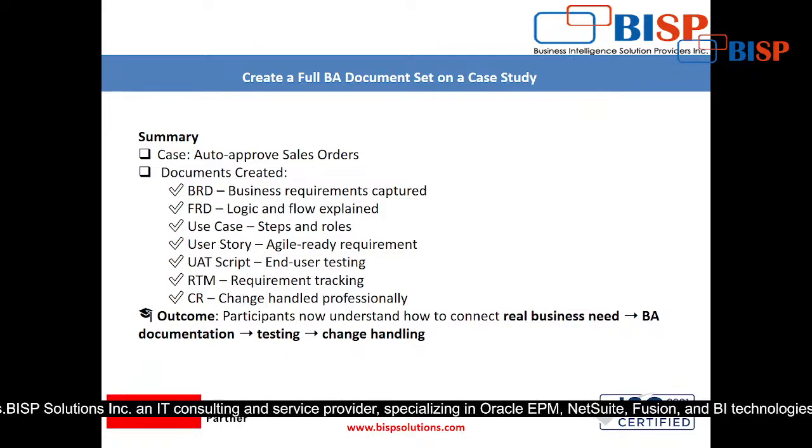Now in this testing process, again it will take 1 or 2 weeks, right? Many times if the project is a remote project, it depends on the project, because when you give any document to the client side for testing, it is not necessary that immediately you will get the response. So the testing will take near about 2 weeks, and then the change handling.